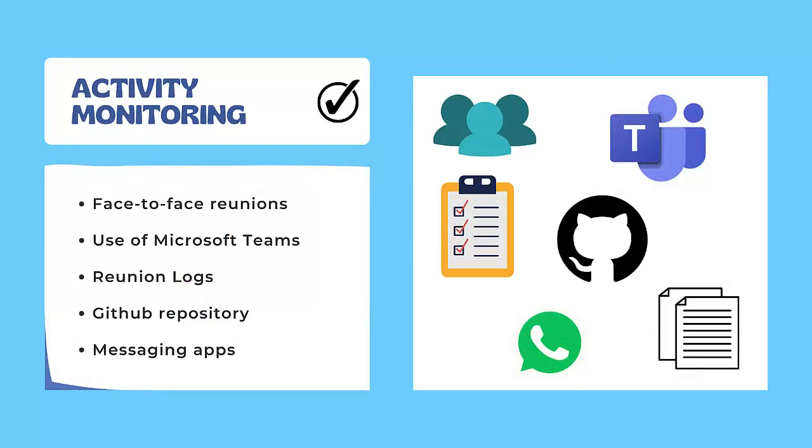Methods and tools. GitHub. A project is an adaptable spreadsheet that integrates with your issues and pull requests on GitHub to help you plan and track your work effectively. You can create and customize multiple views by filtering, sorting, grouping your issues and pull requests, adding custom fields to track metadata specific to your team, and visualize work with configurable charts.